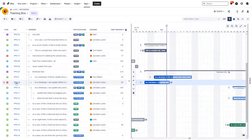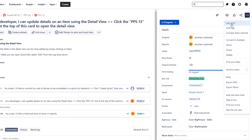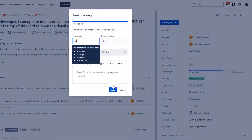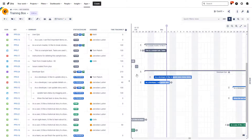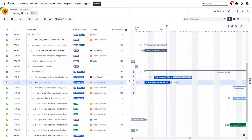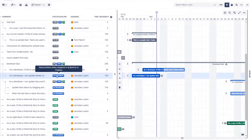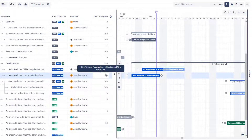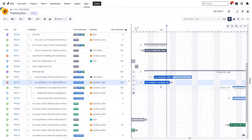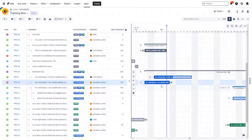So if I go and add some hours to this task — I'll add two more days as completed — I'll go over here, select log work, add two additional days like that, and save. After coming back, we can now see that this task is completed because there were just two remaining days and I've logged those. The remaining estimate is now zero, so the bar is completely filled up to the end. This field looks at estimates and logged work, not the status itself. I'll delete that log work in the background so we have more interesting data for the next part.